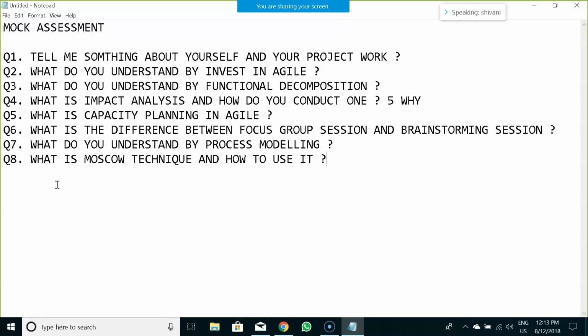The could-have category has the additional features which are required, basically the user requirements which we get. Those can be done at a later phase in the project, and are not so important. The won't-have category is basically the requirements which are not to be taken into the project. Using all these concepts, we categorize the sprint backlog, prioritize it, and do the sprint review accordingly.